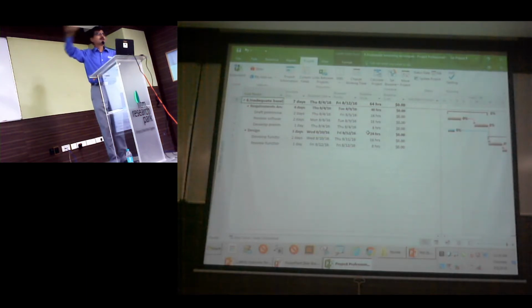Okay? Baseline is something that is frozen. You should not be able to edit it, but Project will allow you to edit it. So which means I can go to this and change 2 days to 5 days, and it will still allow it, but that is wrong. My recommendation is never show the baseline columns to others unless they want it, because they might overwrite some of these values and there is no way by which we can get these details back.